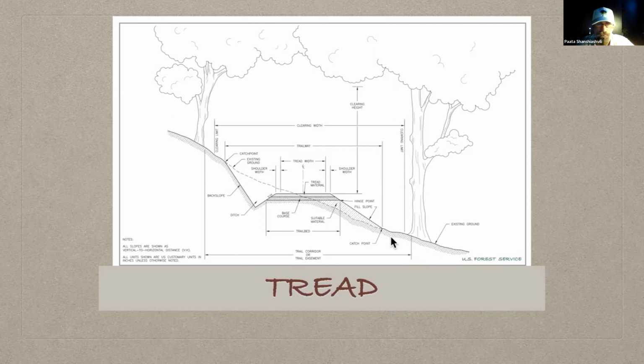So the quantity of soil or earth to be removed affects the cost if you're contracting the work, or even if you're not, it affects the effort that it's going to take to create the trail. So this is important to know how much time and labor and effort it's going to take to build the trail, to know whether there's a lot of excavation or not much excavation.